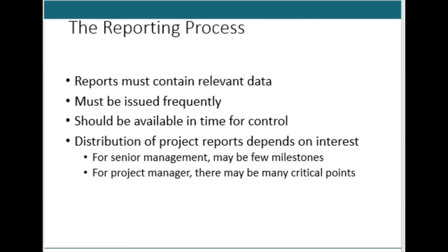So the reporting process has a relationship, and the relationship of project reports to the project action plan or the work breakdown structure is key to the determination of both the report content and the frequency, which often come up. So reports must contain data that's applicable to the control of the specific task. See how through this whole conversation, I'm not really able to differentiate or segregate monitoring from controlling. I really think they both belong together. So this chapter this week and next week, consider them in context, in unity, not as separate weeks really.